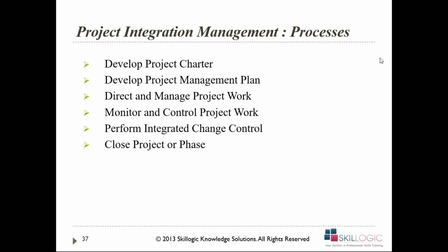We go and close a project where we do the financial, legal, and administrative closure. Right, so this is the section where we update the lessons learned document. We ensure that the lessons learned document is updated, and whether the project is terminated or successfully completed, we need to ensure the lessons learned document is completed, so that we don't repeat the same mistakes again and again, and we move forward with our project.